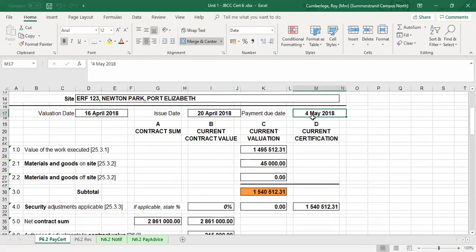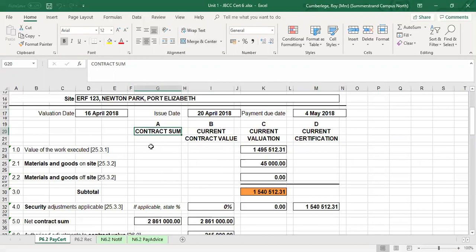If the contractor is paid after the 4th of May, then default interest will be applicable. When we prepare the next certificate, we will have to ask the question: was the contractor paid on time — in other words, was the contractor paid before or on the 4th of May?